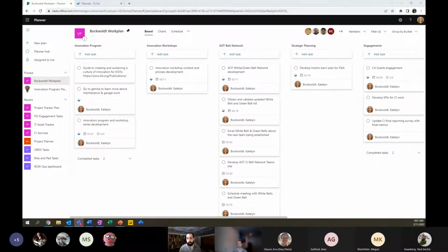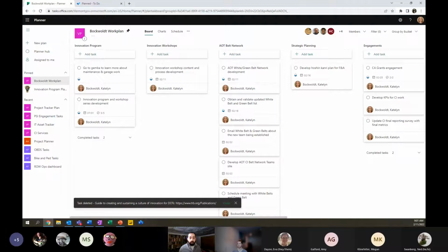One of the things that I really love about it is it works really well with Power Automate. I set up a system where if I flag an email, it automatically creates a Planner task for me, and automatically sets the dates relative to what I did with the flag. And it's really useful because one of the things people are doing a lot more now is, instead of sending attachments in their emails, they are sending links to files.